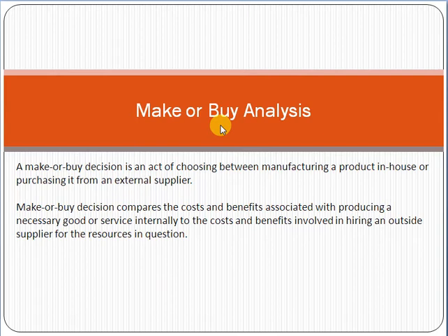So what you will do is make a matrix, you can see it in any Excel sheet, and put all the options there, like make or buy. If you build it by yourself, involving your own resources, what is the cost, what is the time required, what issues and bottlenecks are there. If you buy it from a third party or outsource it to a third party vendor, what is the cost involved, how much time is required, what are the risks and issues involved. So you will make an Excel sheet and analyze all the factors based on the decision,